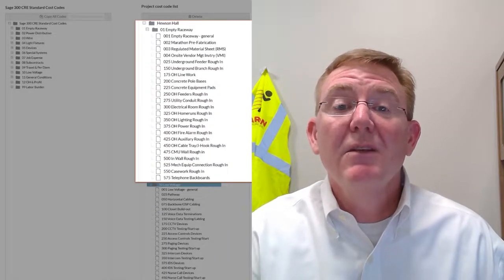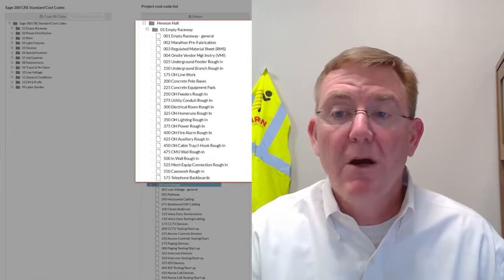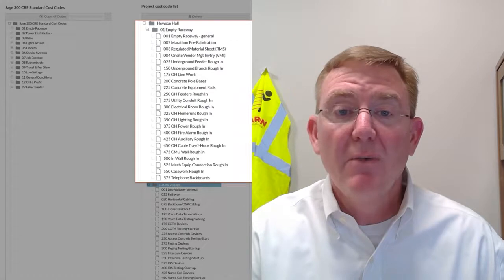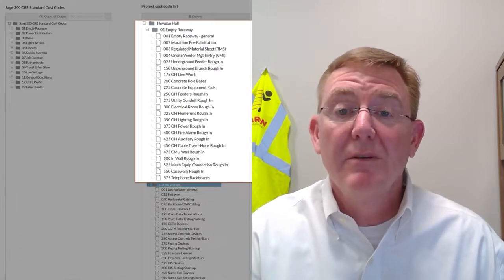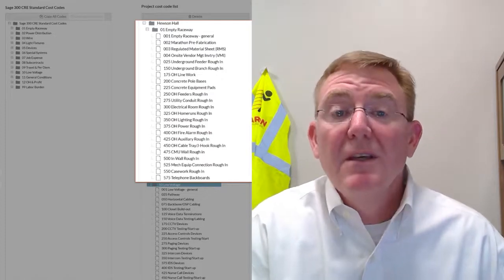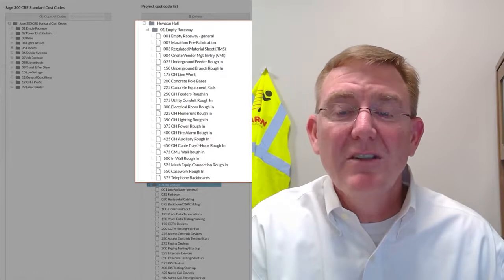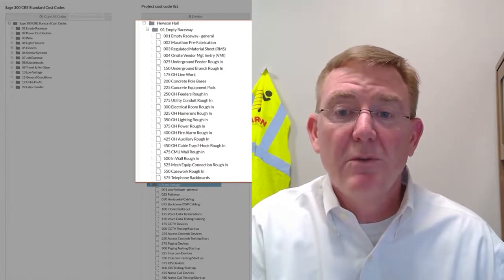From the beginning, when we started adding new projects in Procore, we would set up all 100-plus cost codes, even if they weren't all needed at that point or for that project. Although there were grumblings from the team about too many cost codes, we really didn't think too much of it because we felt like this was the right approach.